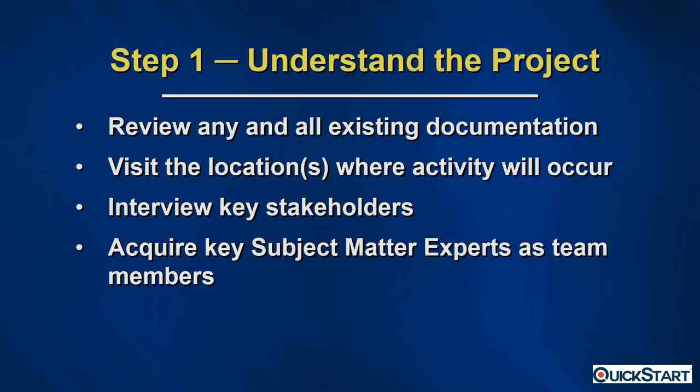Step one — understanding the project: you would want to review any and all documentation that exists around the project, visit the location where the project or activities are going to occur, interview any and all key stakeholders who have a vested interest in the project, and make sure you acquire key subject matter experts as team members to help you understand the project.